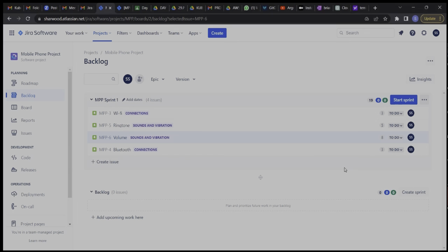So now our vote of confidence, I'm asking the team, so the work that we have for the sprint, are we confident that we will be able to complete it by the end of the sprint? Okay. So let's assume that everybody says yes. Most of the time it will be from 1 to 5, right? 1 meaning we are not sure, 5 meaning, great, we can do it. So the team member says, sure, we can. So I'm just going to go ahead and click start the sprint.